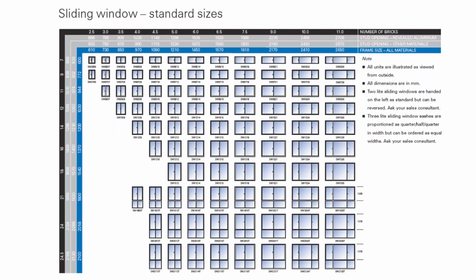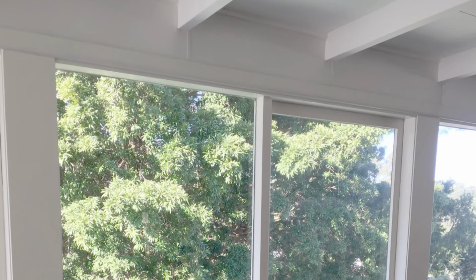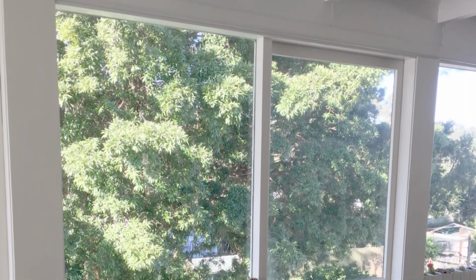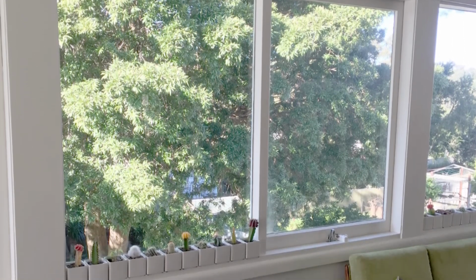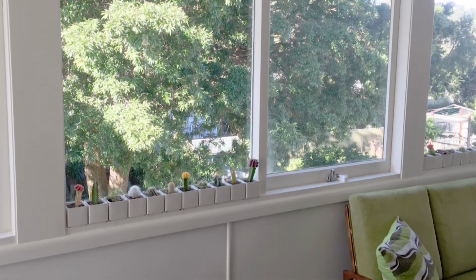For this reason, the draftsperson has been engaged to produce new accurate drawings of the house to determine if standard off-the-shelf windows are available to fit the existing openings and the proposed new ones, or if bespoke items will have to be crafted for this house. The client has specified that they would like all the new windows and doors to be cedar sliding rather than matching the existing awning type. The existing fixed pane and awning windows in the middle of the sunroom are to be replaced with a sliding door to the proposed future deck off this room.